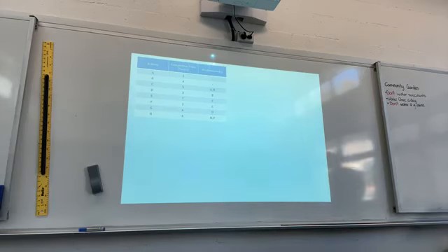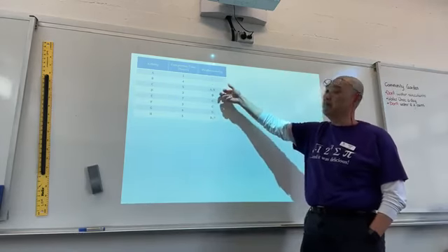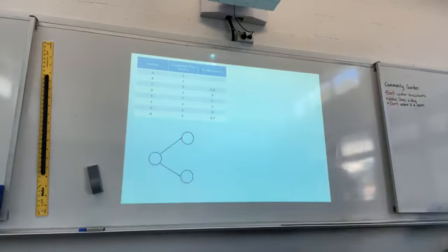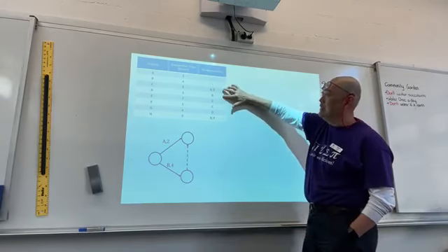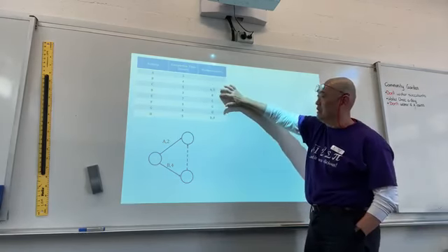And then C and D. C is dependent on A and B. D is only dependent on B. So from B, I need to split it into two vertices, one with a dummy activity. Start off with AB, and then CD here.